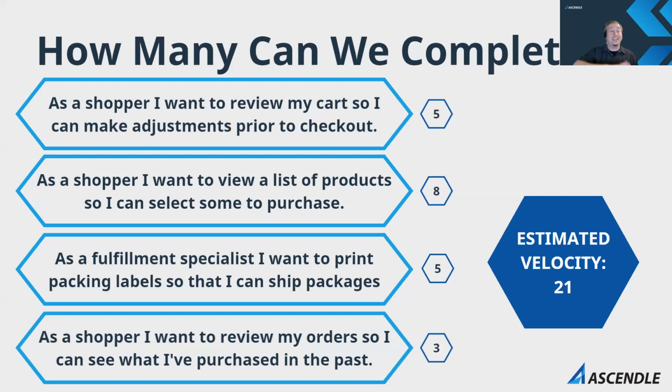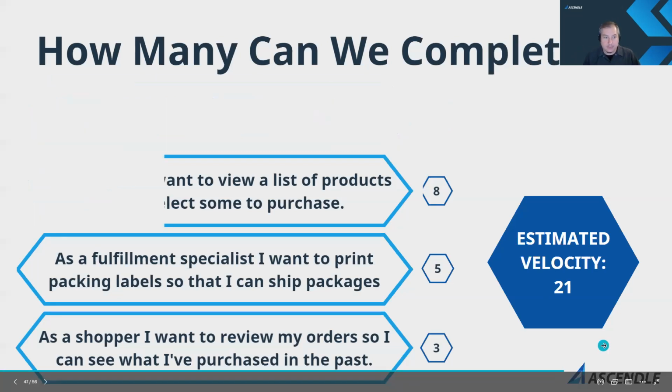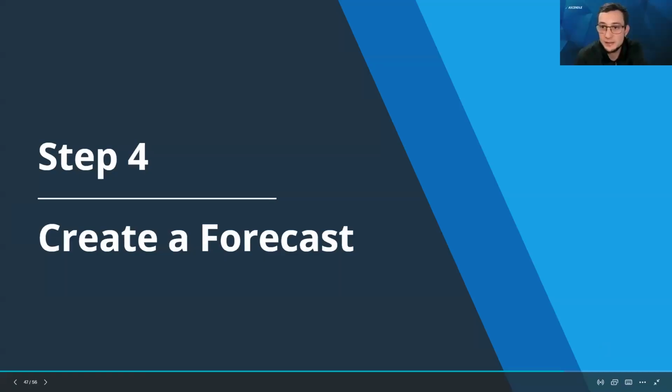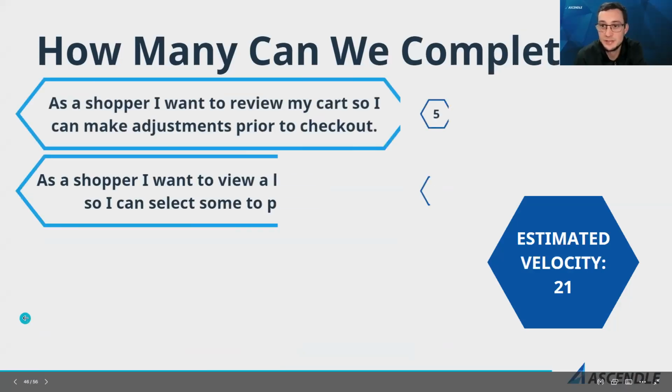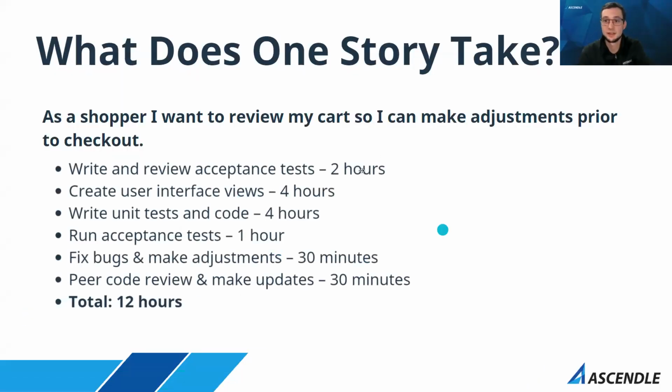Once again, that is the least optimal version. Usually the best one is your average running velocity of story points for the last 3 sprints, but that's what we're doing here to get there from here. It's also why we encourage subtasking, because it's much easier to estimate what it takes to do something very particular, like write an acceptance test, than a whole card. It's easier to estimate 2 hours on writing a view acceptance test than 12 hours on a whole story.